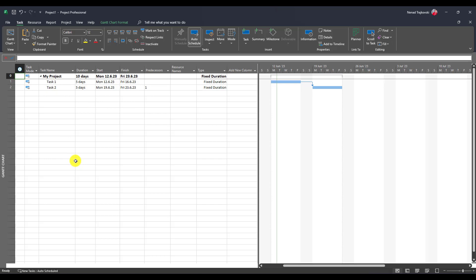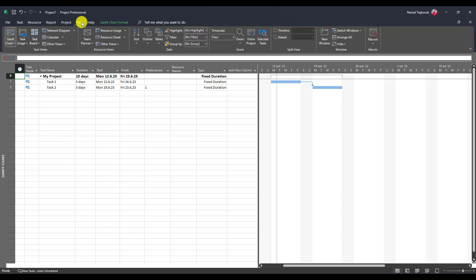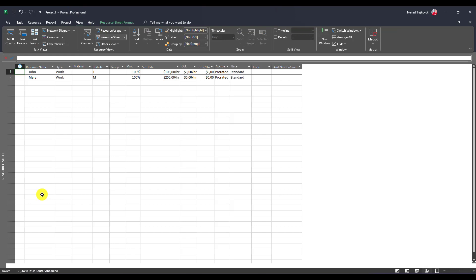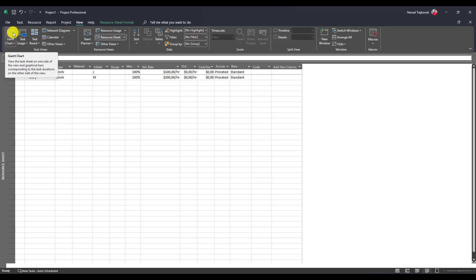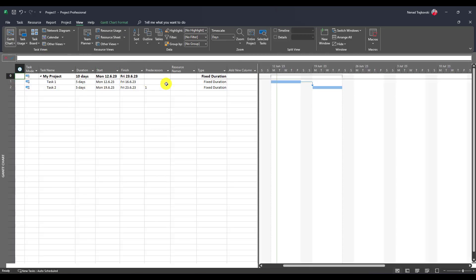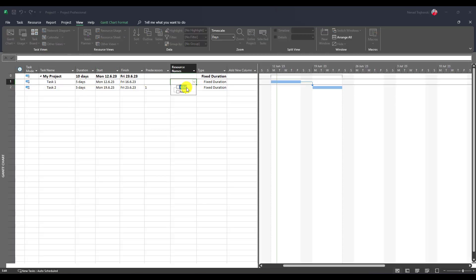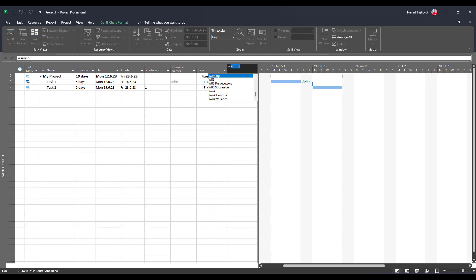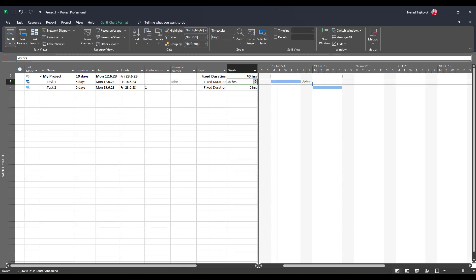Let's go to resources and resource sheet. You will see that I have John and Mary. Let me assign John to task one and let me add work here to see how much work. Five days multiplied by eight hours by John equals 40 hours. Great.